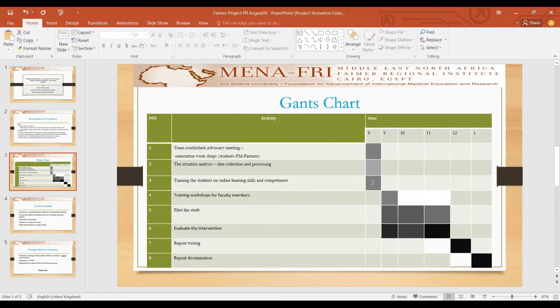Training of the student learning management system, as you can see, will take place at the end of August. The training of the selected faculty members is planned to be done during the first week of September. Piloting of the project program with the evaluation process all throughout is planned to be during September and October.